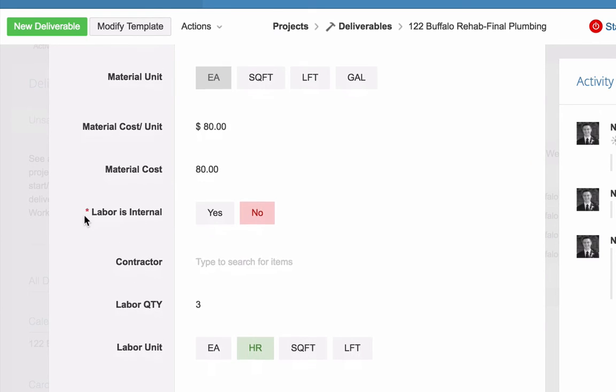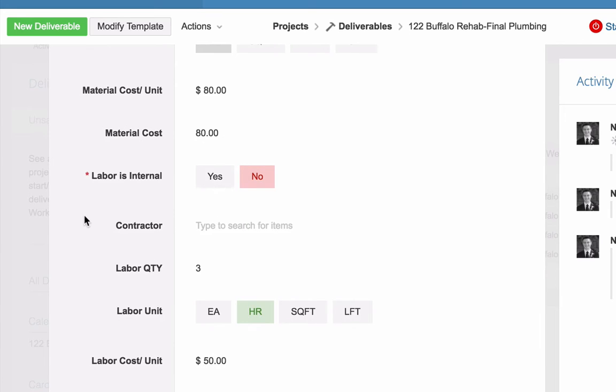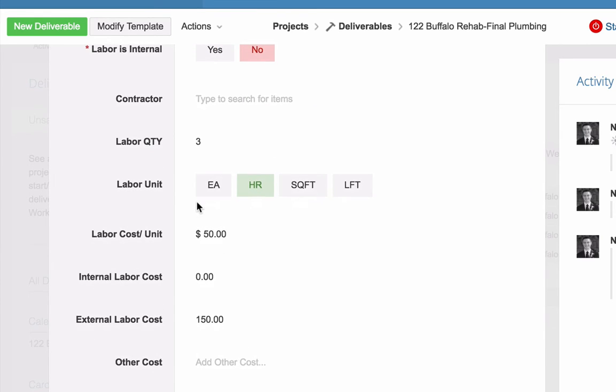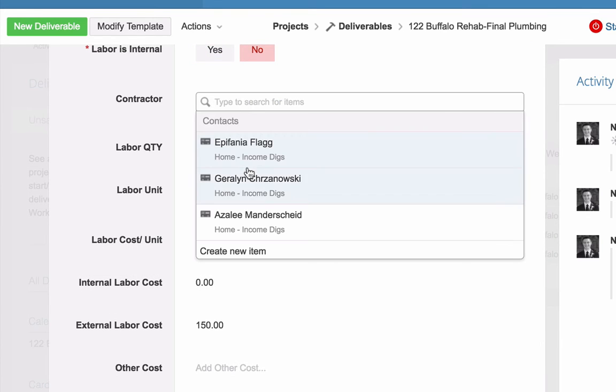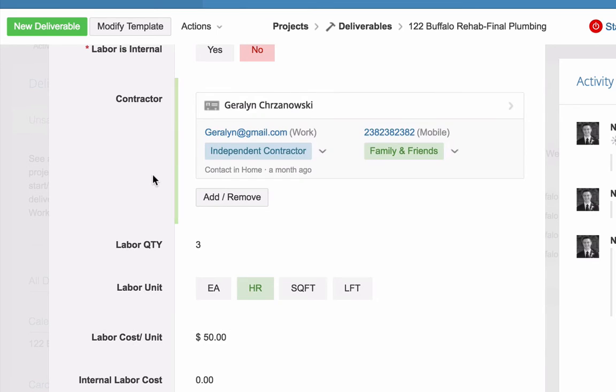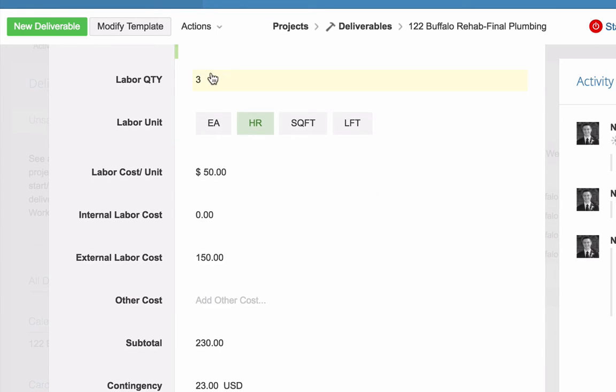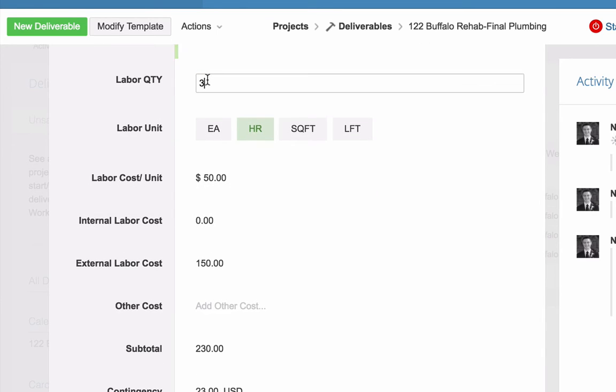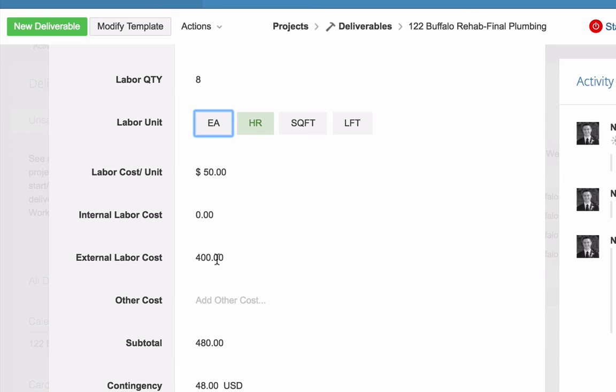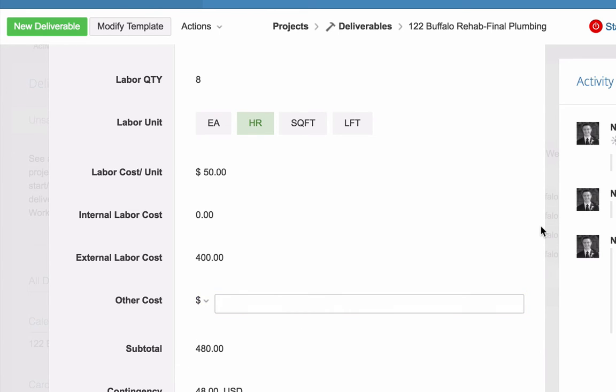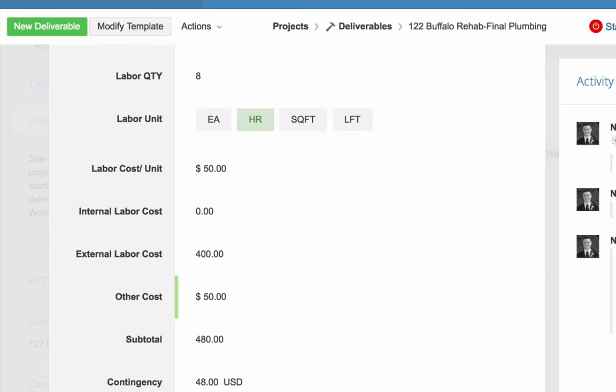Labor is internal. We're going to talk about that later. Okay. Let's stick with the other stuff here. We're getting into the labor section here. Here you could pick a contractor. If you want to track who's doing the work. Again, if it's not you who's doing it, that might be somebody else. Okay. So you can put them in there labor quantity. Okay. So this is something where maybe somebody is going to spend a full work day, eight hours. They're charging by the hour. They're $50 per hour. That's $400 in labor. All right. Cool. Other costs. Maybe there's $50 worth of miscellaneous material we're going to buy. Maybe. I don't know. Okay.